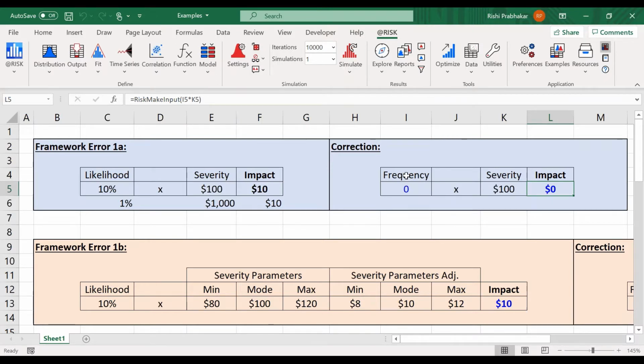So we've got a super simple situation there. The only source of variability is that the event will either happen or not. I model that variability using an appropriate probability distribution, and now my spreadsheet is actually returning outcomes that can happen. In combination with other indirect and direct costs or inherent and contingent risks that I've modeled, this cell can now be referenced by my sum function, and it's producing actual total possible outcomes.